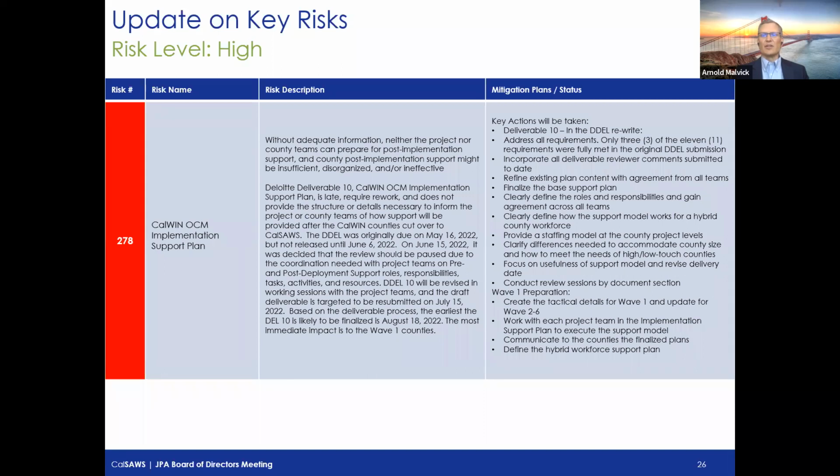Yes, there's increased communication going on with all the remaining counties, just to reemphasize the need for the communication there, and the need to have the outreach to the county MIS departments for tighter integration. So that is a lesson that we harvested and are encouraging the region managers to work with the county directors to implement. Okay, and I'll just implore our board of directors in your regions to reach out to your fellow directors in that region to also check on their status and whether or not they're having any issues in that area, because network stability is going to be crucial during this time frame. So we really need to make sure that we can head that off.